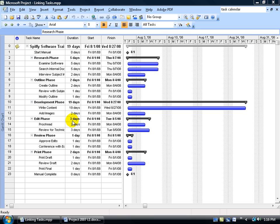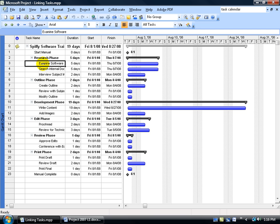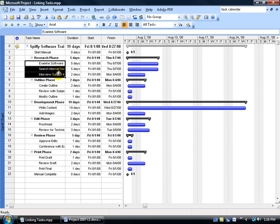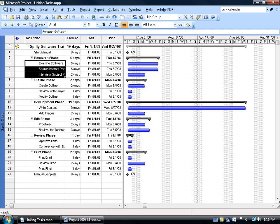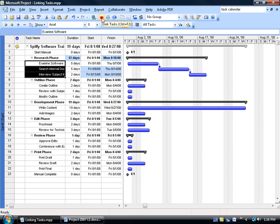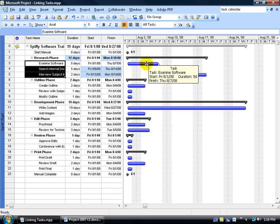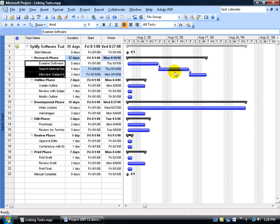To do that, it's really easy. All you have to do is go ahead and select all your subtasks. For example, clicking and dragging down below and select my three subtasks. I want to link those three together. I'm not going to link my summary task. By default, when I link the subtasks, the summary task will follow suit. So if I go ahead, to keep it simple, select these three subtasks that I want to link. Come up here on the standard toolbar and click on the link task button or hit F2 on the keyboard. And you'll notice, again, they're linked, but how are they linked? By that default relationship, finish to start. Meaning that the predecessor, this task right here, must finish before this task can start. And then looking at this task, its predecessor must finish before this task can start. So you're looking at completing that task, then you can go to the next one, then you can go to the next one.